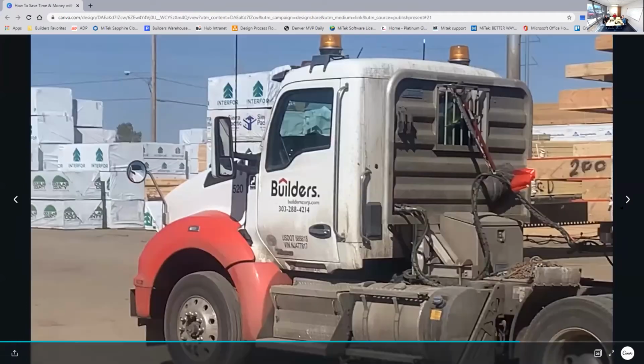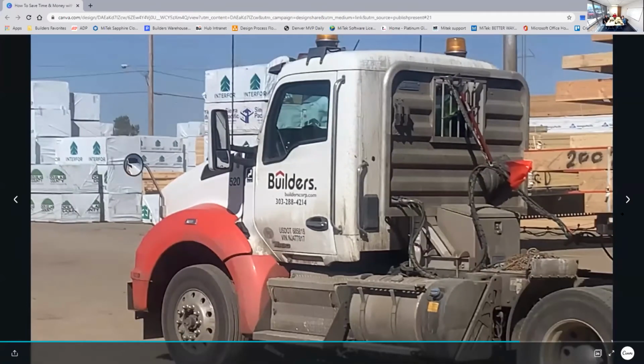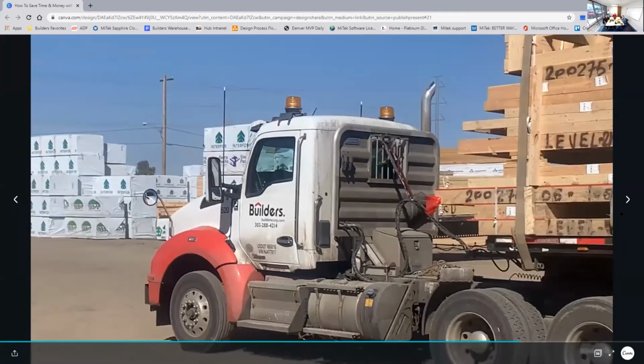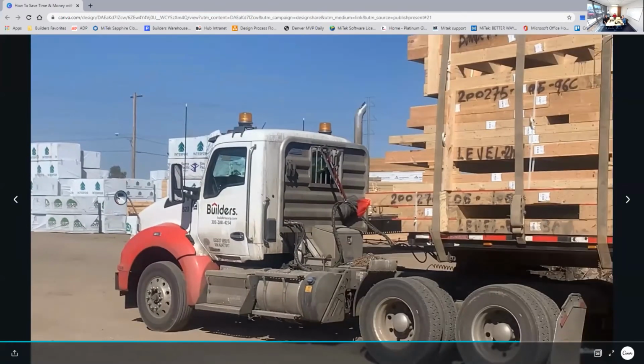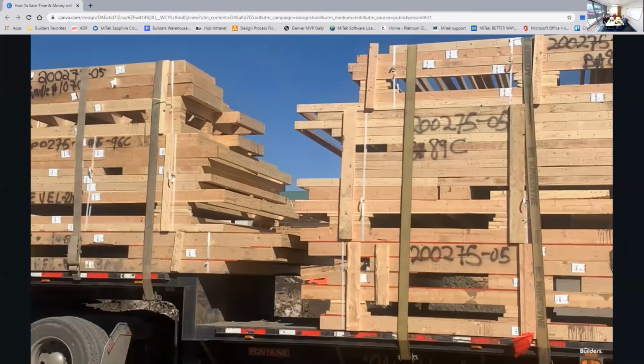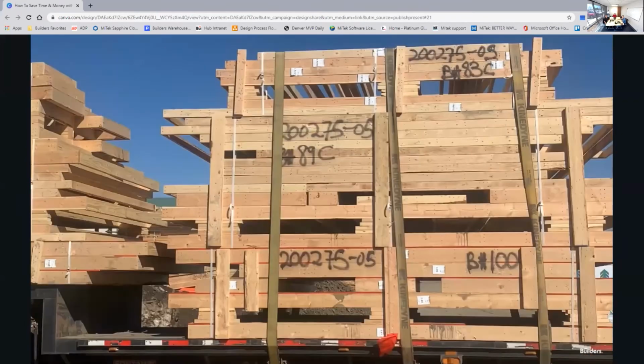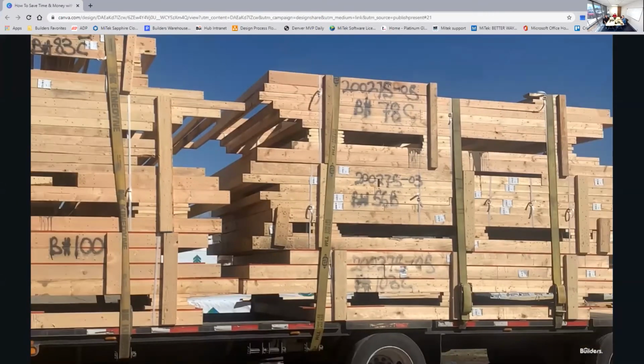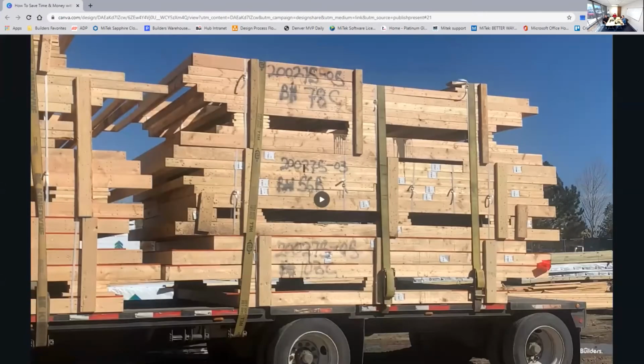And another thing in terms of delivery is our panels are sequenced in a certain order, so it's a little bit friendlier for the framer on site. When we talked about giving us detail up front, if they tell us we're going to start in a certain corner, or we're going to build in a certain way, we can marry up to some degree the sequencing of those bundles.